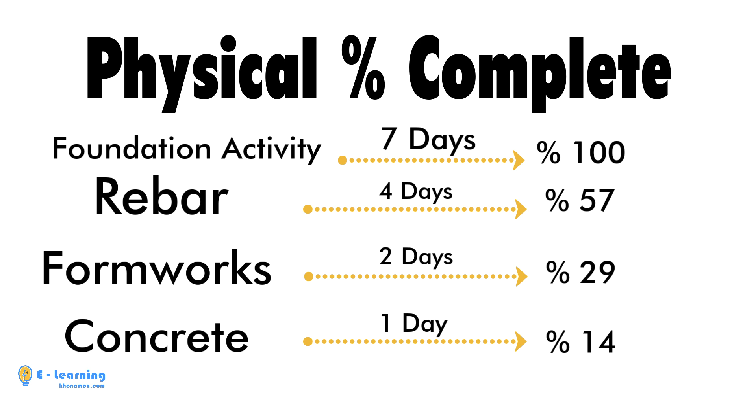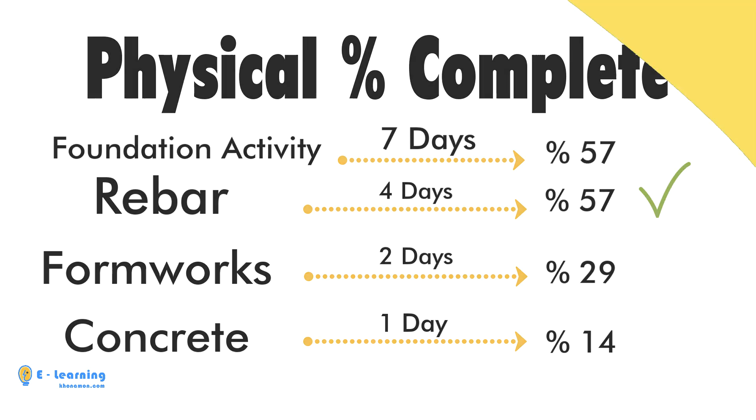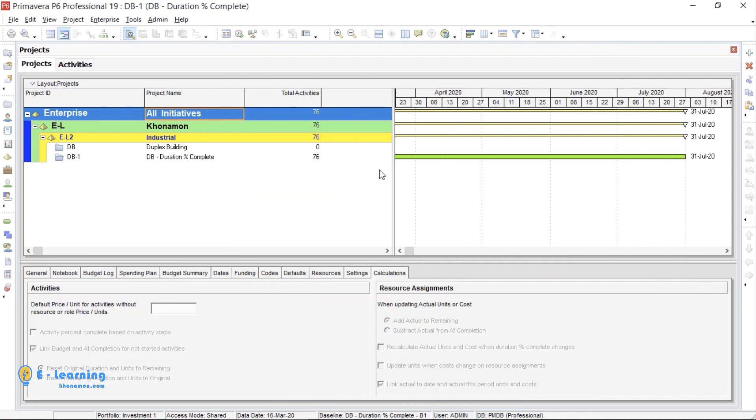Now, if we want to know how much progress we have in foundation, we will check its steps. If we finish rebar, then we would say that we have finished 57% of foundation. Now, it is time to implement this in Primavera.